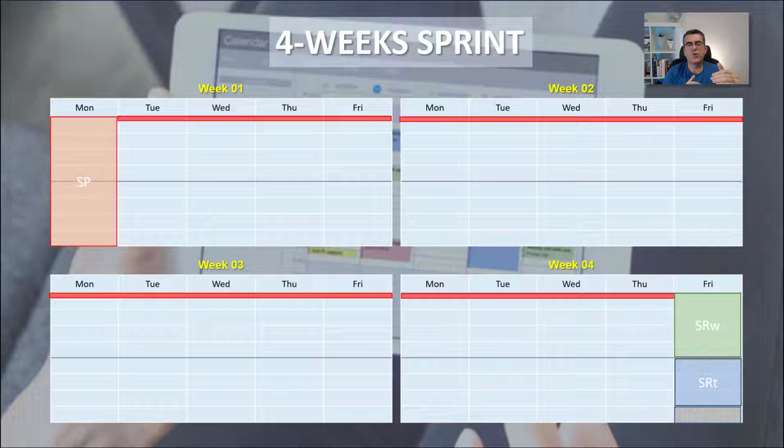So they will finish the sprint on Friday by 4 o'clock, and they will not start the next sprint exactly after this sprint. They will wait until Monday, because this 1 hour is not, I would say, well used in terms of production once you finish your sprint to start the next sprint.